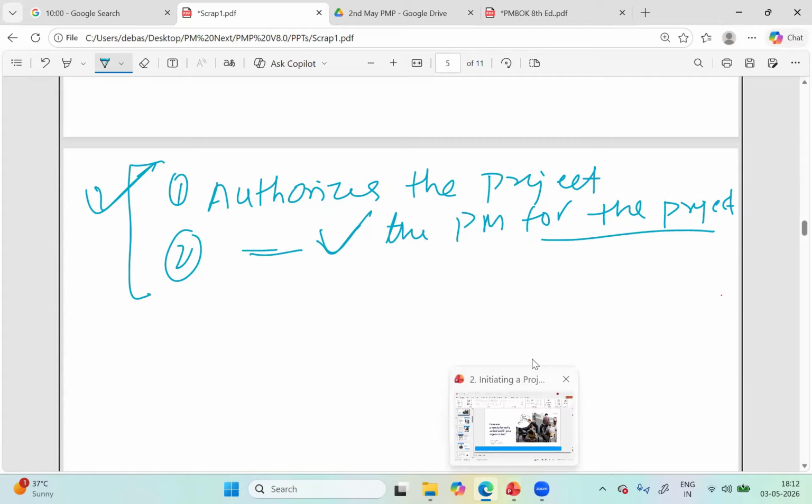I hope you don't confuse charter purpose with business case. Do you confuse? Shouldn't. What is the purpose of business case? Business case purpose was go, no go decision making, funding approval. Understand it this way. Let's say business case is approved today by the decision authority. What does that mean? Doesn't mean go start the work. No, it means the company in principle agrees to make the investment. Funding approval given. Doesn't mean go start.